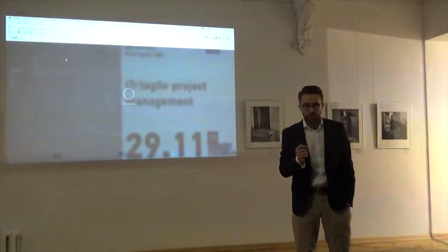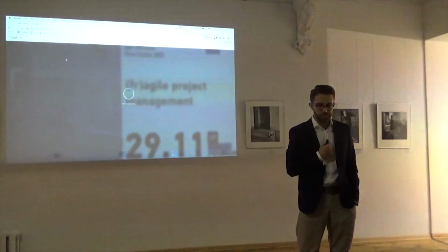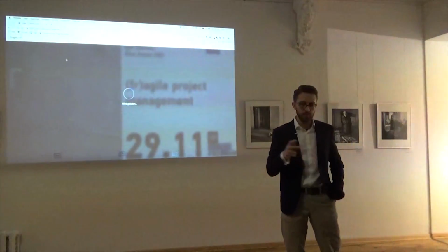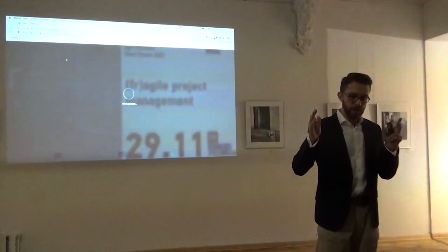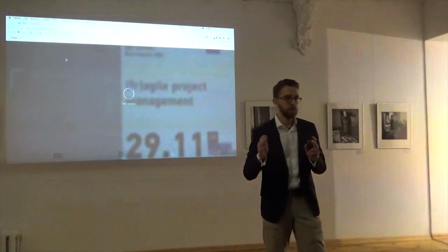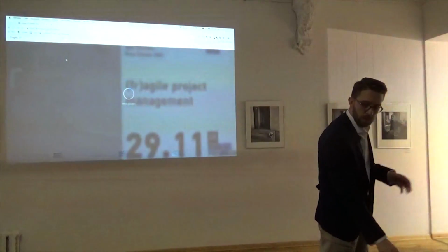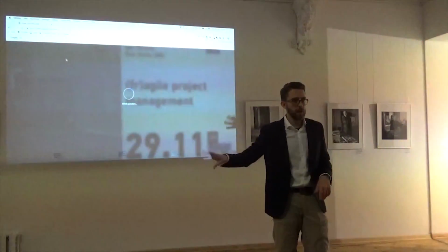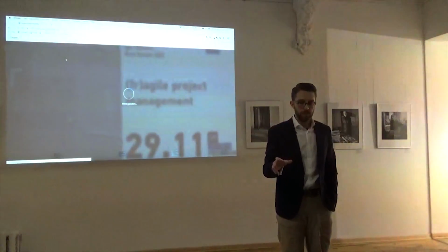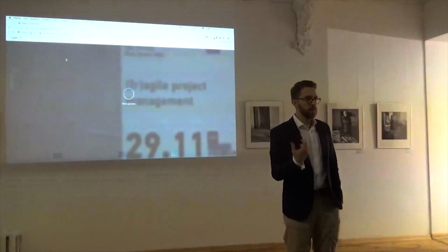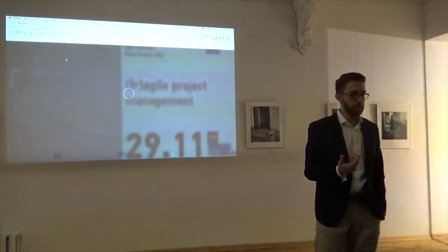There is one point which is for me also very important, which is not mentioned in the guidelines of Kanban or stuff like that. It's the last field, the done field, what was achieved. So usually you could go through the process and then put your task away and throw it away. But the done field is very important to see and to motivate the team, actually. I think this is a very good field.